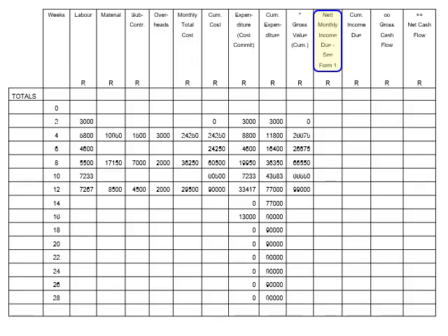According to the assignment brief, we know that certification for progress payments takes place once a month, and payment will be received 2 weeks after the date of certification. However, the brief also stipulates that 10% retention will be deducted on each claim throughout the project, of which 5% is released at practical completion, and the remainder after a maintenance period of 3 months.